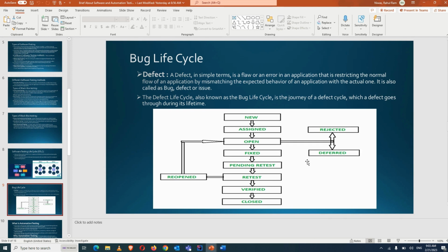But most of the time, they even roll back the Jira that they were developing, because the client will not allow half a Jira to be developed with a bug and go into production. Whatever is going in the backlog will be developed in the next cycle, but the current cycle will go into production, so they can't send functionality which is developed with the bug. So sometimes I have seen they completely roll back the Jira also. Yes, it depends upon the effect, how much it is affecting the business flow. Based on that, they will do it.